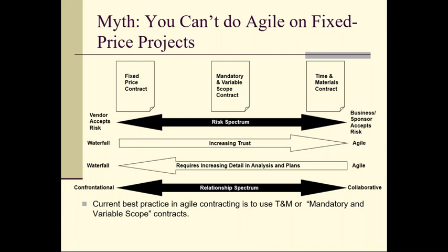So we have the mandatory phase, which is a waterfall that takes 6 months, and then we have 6 one-month mini waterfalls following that to deal with the variable scope phase. So my total project then is 6 plus 6 one-month iterations. That's a 12-month project. I've got a fixed timeline.